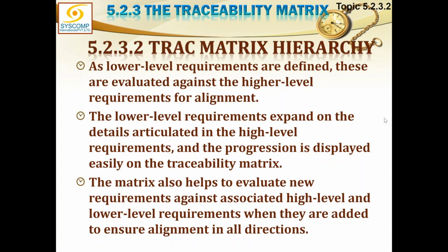So those requirements which could be further broken down would be broken down to that level, but all requirements may not be at the same level. So you can progressively elaborate on those requirements. Maybe at a later stage, I learn that even 1.2 can be broken down. So I can always break it down there and amend my traceability matrix. Are you with me on that? Yes, sir.